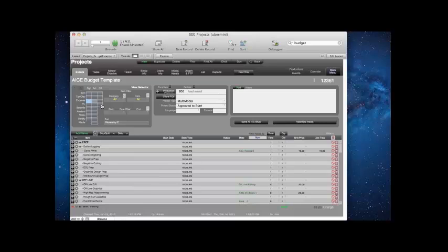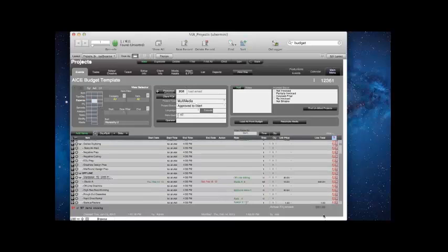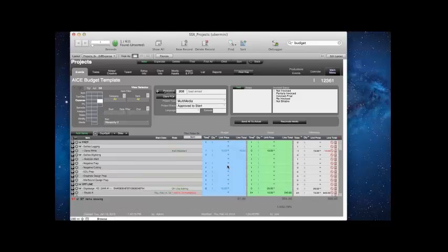And then over on my actual, the expense was $691, and that means that the difference between the expense that we thought it was going to be versus the actual is 630, and that's a 1,000% increase in our expenses. So it's time to go yell at somebody for doing a bad job on the estimate there.